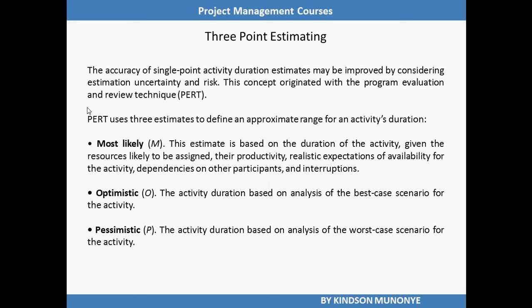But you also make another, very optimistic one, and that is the activity duration based on analysis of the best case scenario for the activity. So you make an assumption hoping for the best. Then you make a pessimistic one based on analysis of the worst case scenario for the activity.